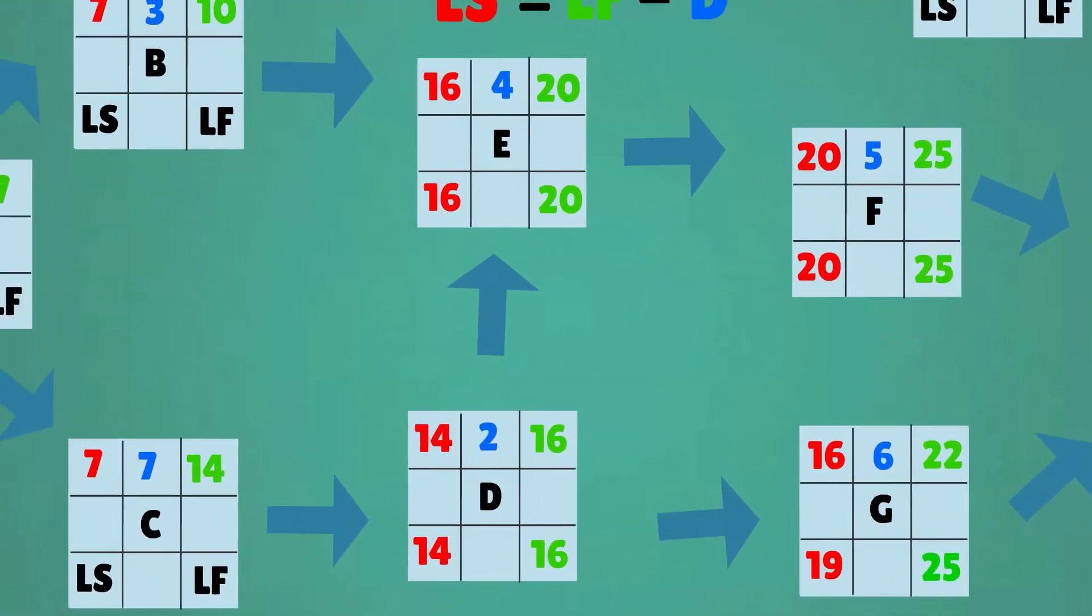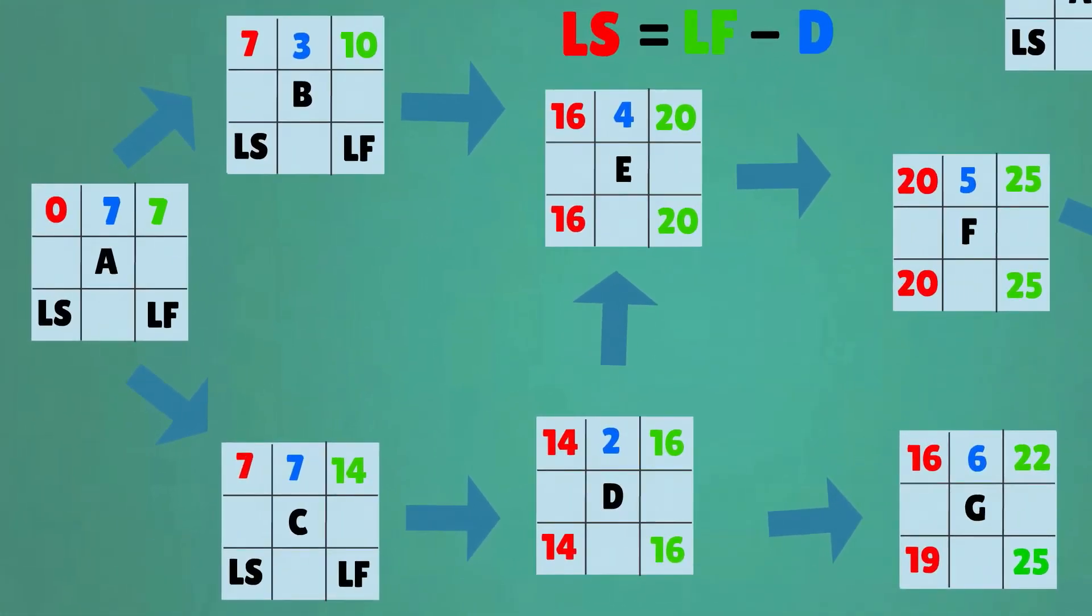The same goes for activity A. As activity B has a late start of week 13 and activity C a late start of week 7, so activity A should have a late finish also of week 7.